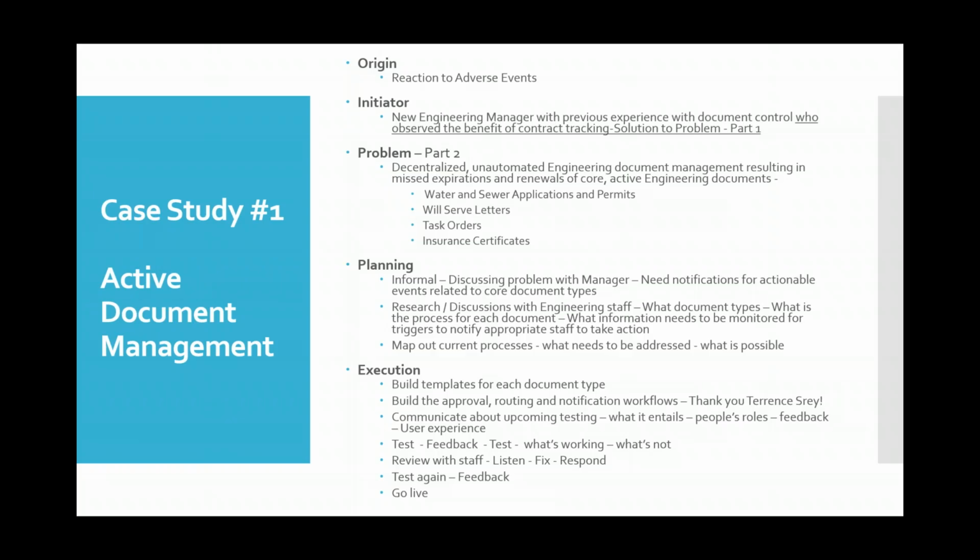And then because it involved the whole department, this is where change management communication was really important, because we had to communicate about the upcoming testing, what it would entail, what everybody's roles were, and that we needed feedback. And then you run a test. I can't tell you how important it is when you run a test to gather as much feedback as possible and incorporate as much of that feedback as possible. The better you are at gathering and implementing feedback on a testing cycle, the fewer iterations you have, and then you avoid testing fatigue and you can go live sooner.